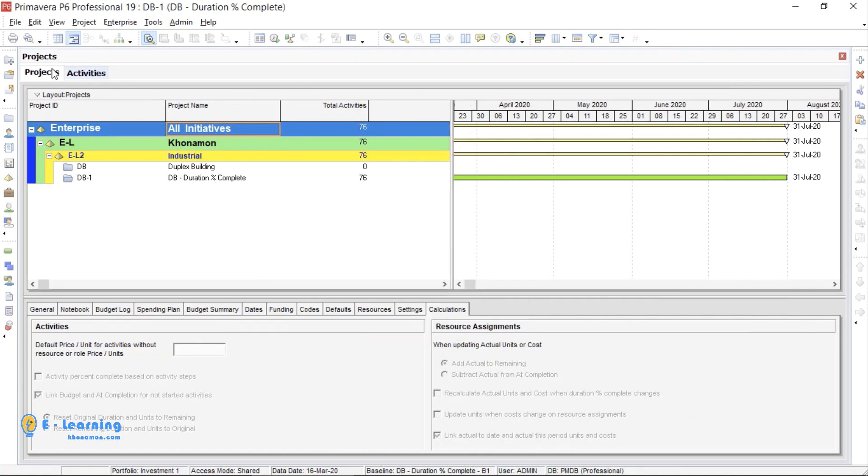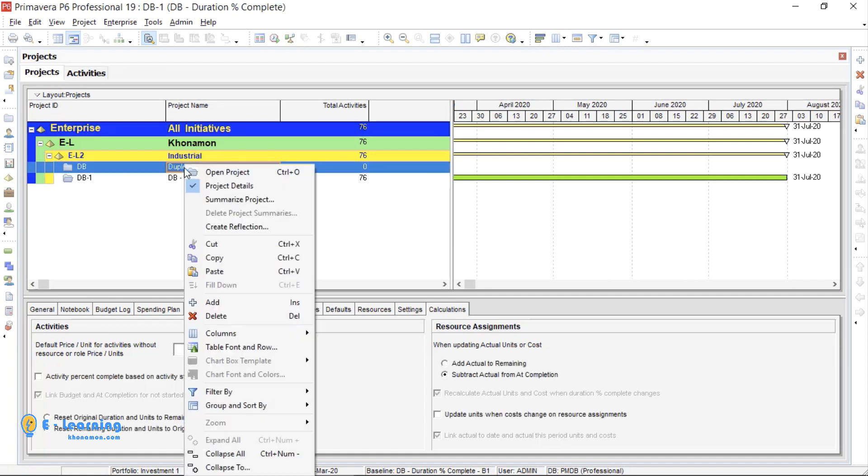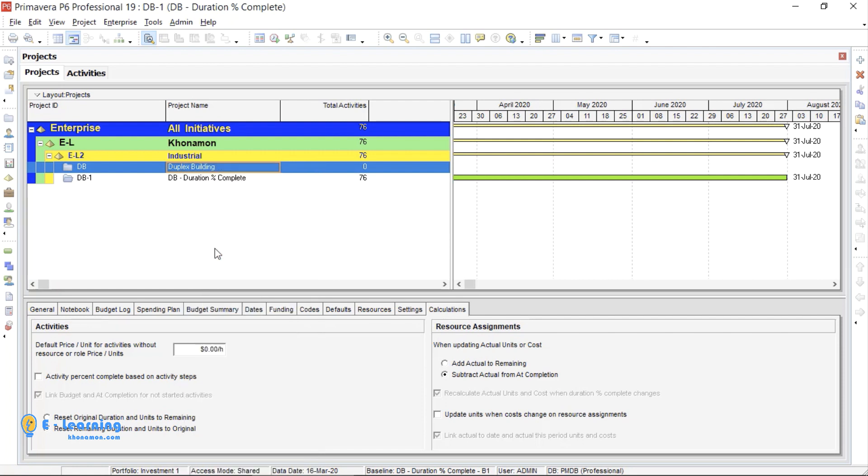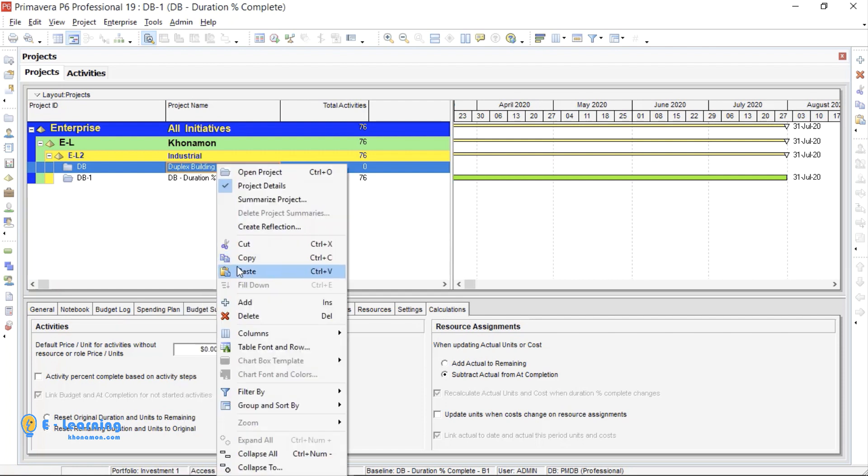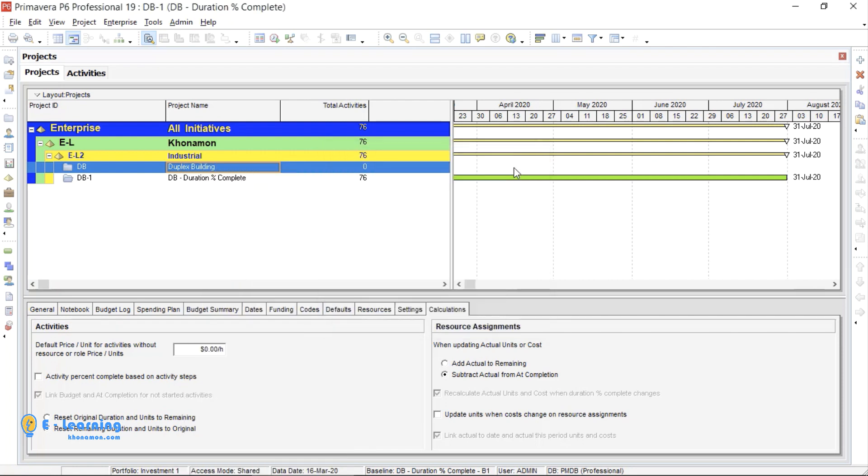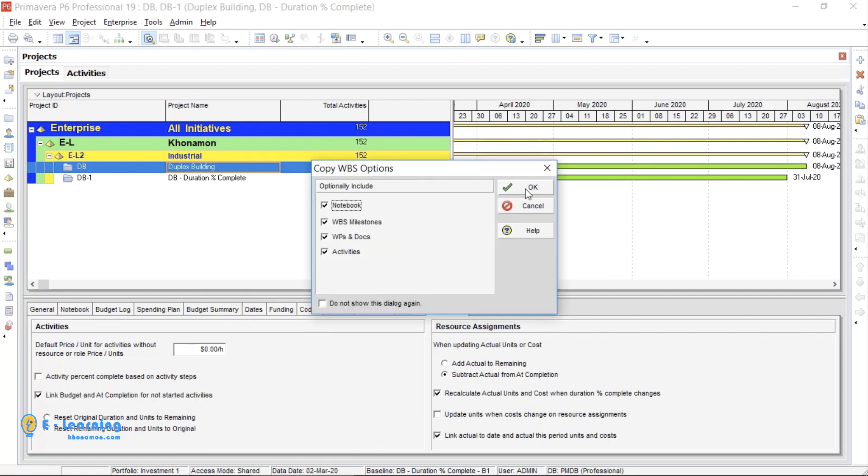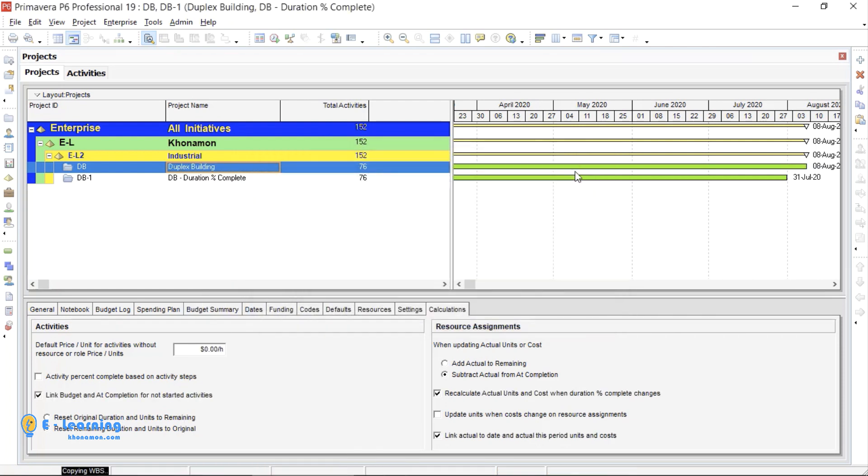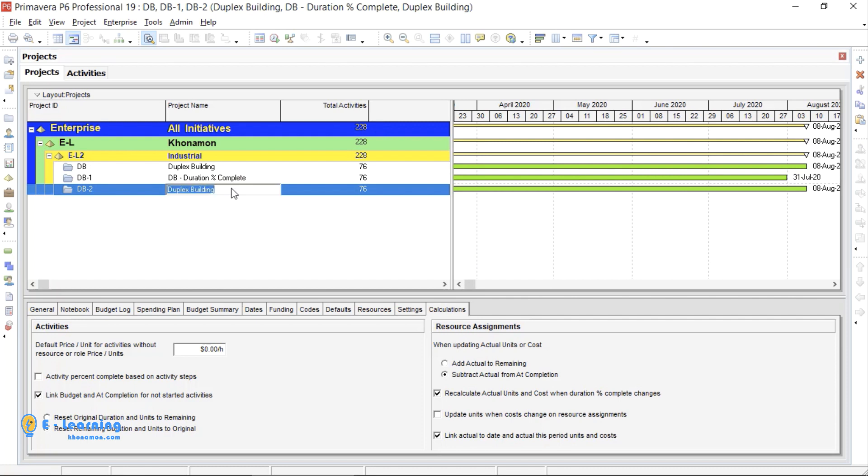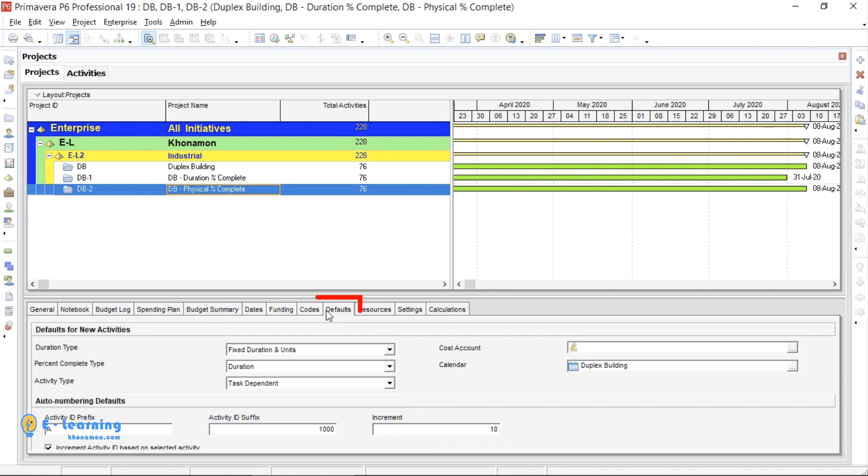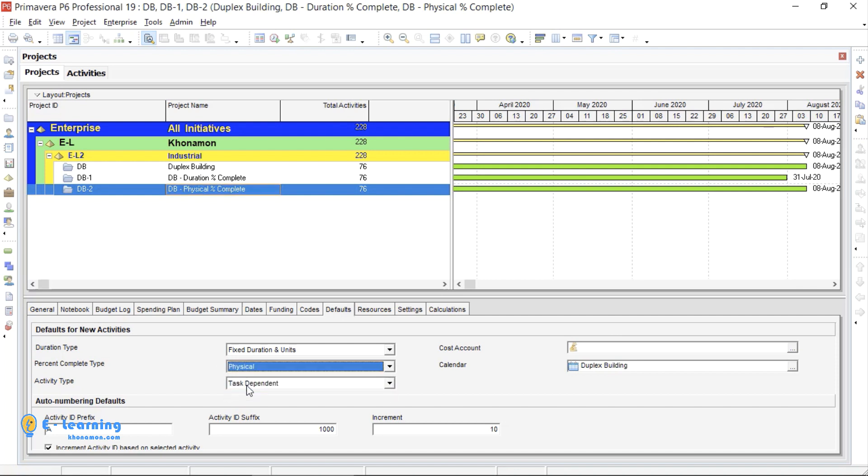From Projects tab, I want to first make a copy from the original project. Right click on the project, then copy and paste. I changed the name, so it is now clear that it is Physical Percent Complete. I select it, go to Defaults, Percent Complete Type, and select Physical.